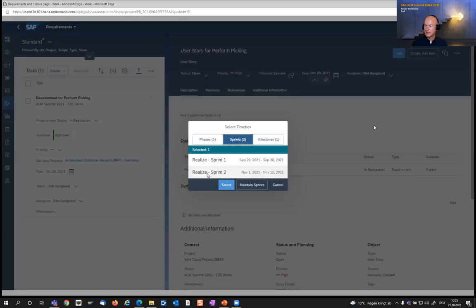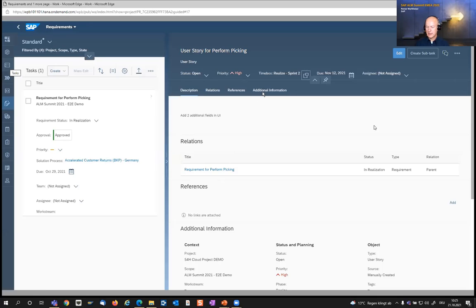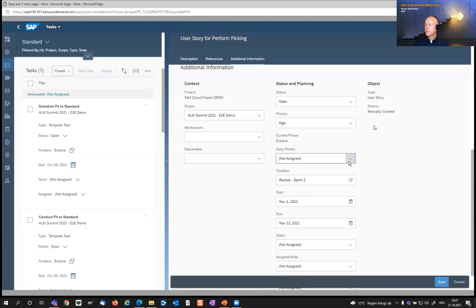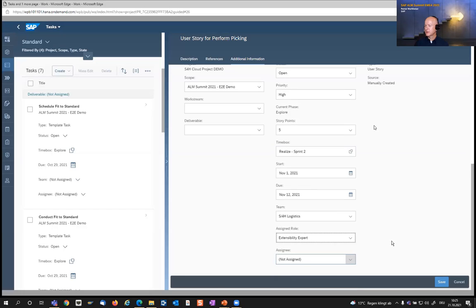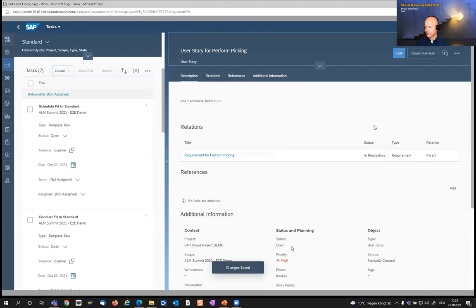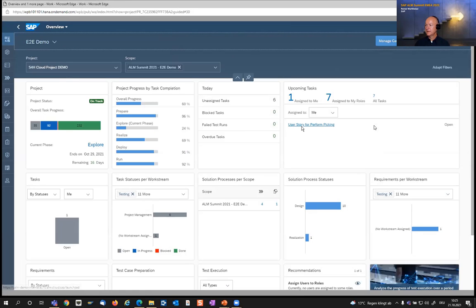I can also schedule the user story with sprints — deciding in which sprint it should be realized. Since sprint one is already over, I select sprint two. Under additional information, I can classify the user story by story points, assign it to a team, assign a required role, and even assign directly the developer who should complete it. The user story then appears in the 'upcoming task' card, which is the trigger for the developer to know they have something to do.